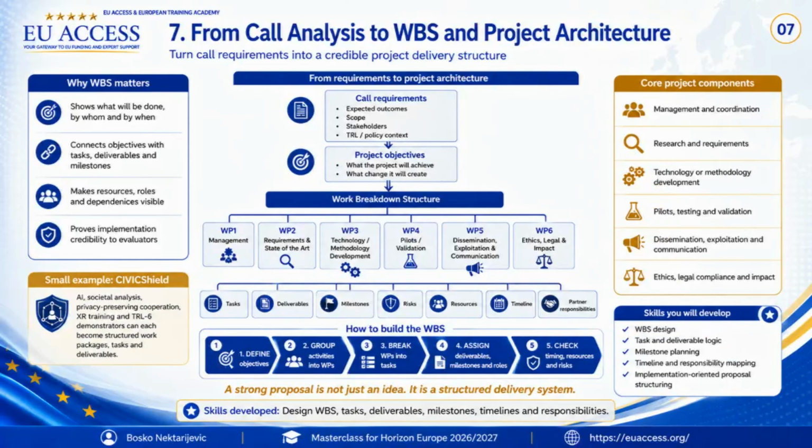A good Horizon Europe proposal is not a collection of attractive ideas. It is a structured delivery system. Participants will learn how to transform call requirements into a work breakdown structure. The WBS must show what will be done, by whom, when, with which resources, and what will be delivered. In the masterclass, participants learn to define work packages for management, research and requirements, technology or methodology development, pilots or validation, dissemination and exploitation, communication, ethics, legal compliance, and impact.